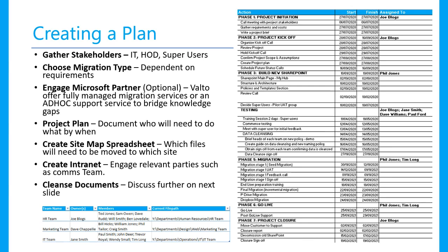Obviously, some people ask how long does a migration take, which is always a question of how long is a piece of string. But typically, once you've done your bulk migration, most small, medium-sized businesses moving stuff across to go live can set it running on a Friday afternoon, say at 5 o'clock, and then on Monday morning you go live when you put the old file server into read-only mode, and everyone starts using it as of 9 o'clock Monday morning. We would often align that with a bit of training, like a refresher session, so everyone's up to speed and able to move forward.